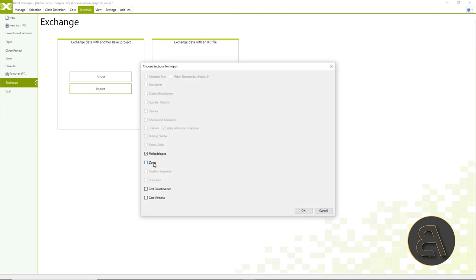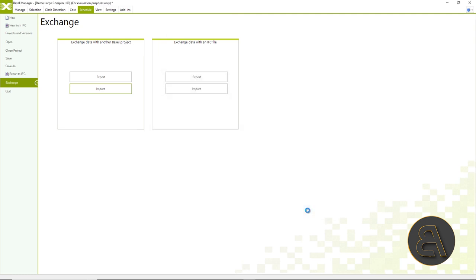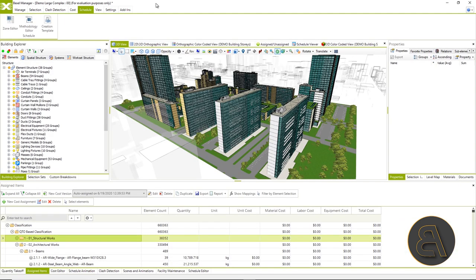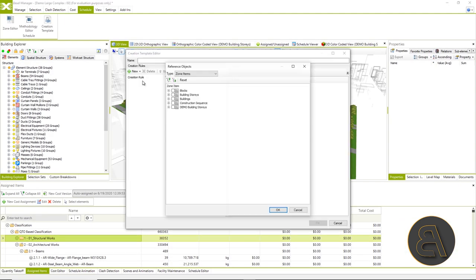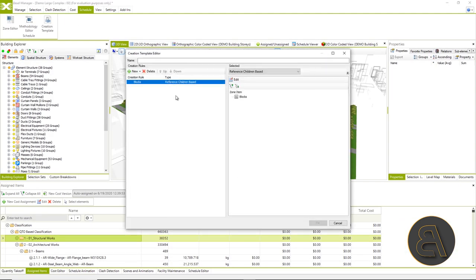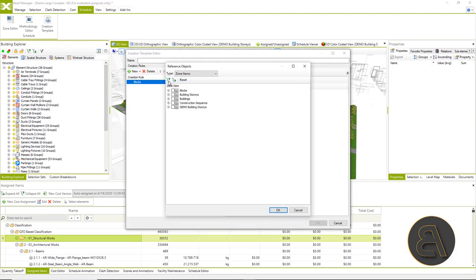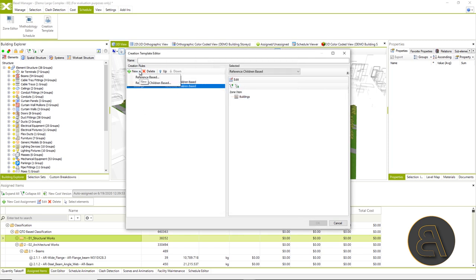Once the methodology is created and we have previously created the zones, it remains for us to create a template in which we will define the order in generating the schedule.